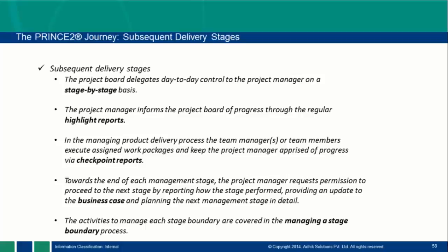First I will create the foundation, then I will do this. So those work packages are created through WBS. And for work packages, the team manager is involved. He is working on work packages. So this report he is providing, the team manager providing to the project manager, that is the checkpoint report, the status of the work package provided by the team manager.